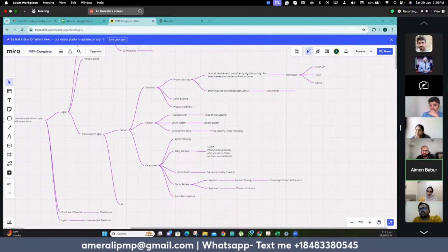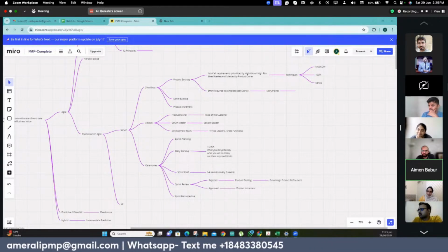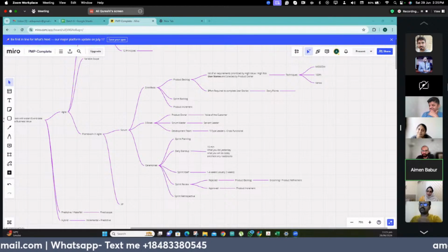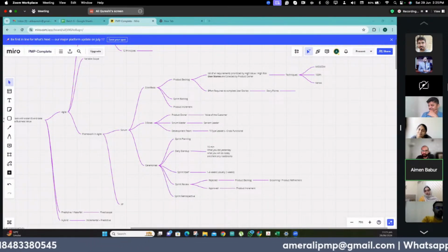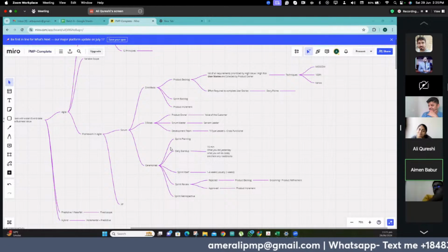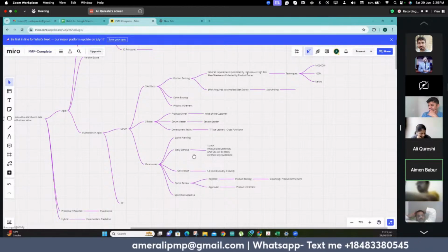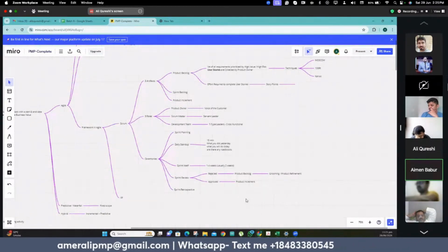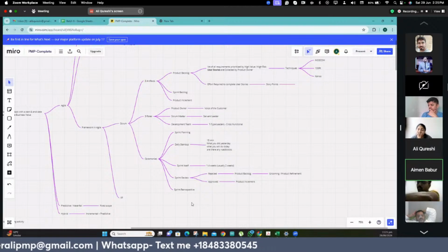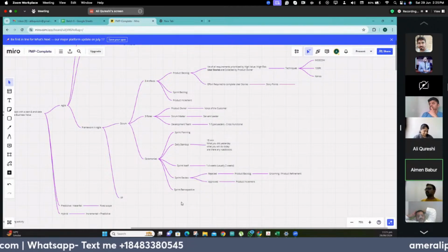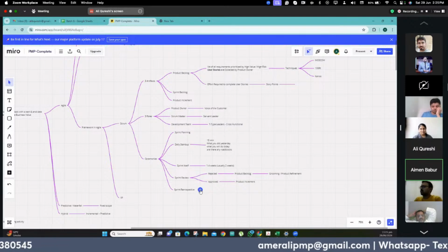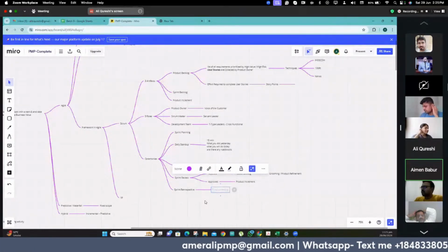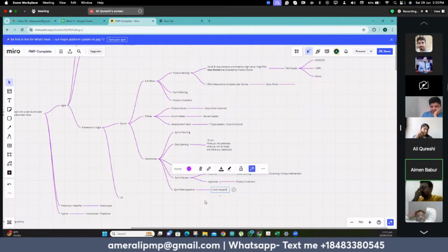If the user stories are rejected, they become part of the product backlog, which is then included in the product refinement, in which we reorganize the product backlog. If they are approved, they are included in the product increment. Then we have a retrospective at the end with the team, in which we discuss what actually happened, what went good, what went bad, and what could have been improved.